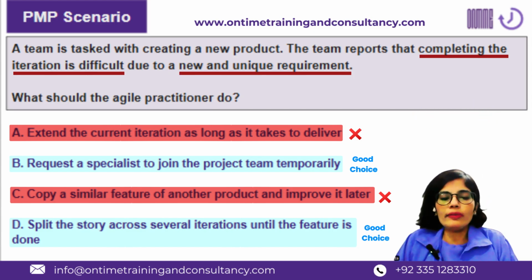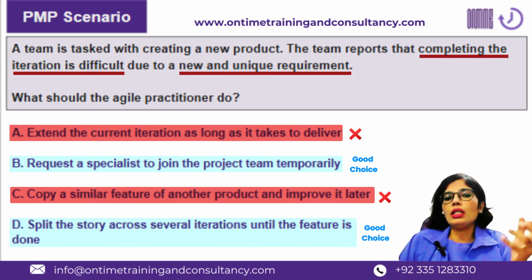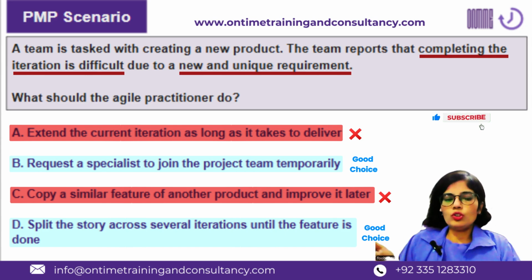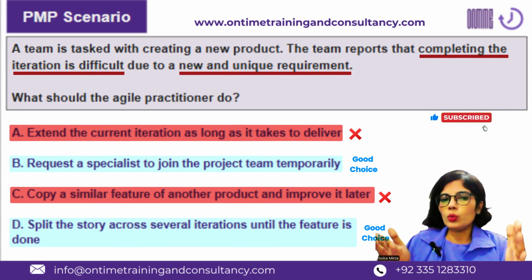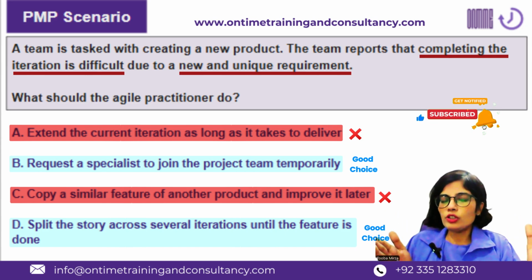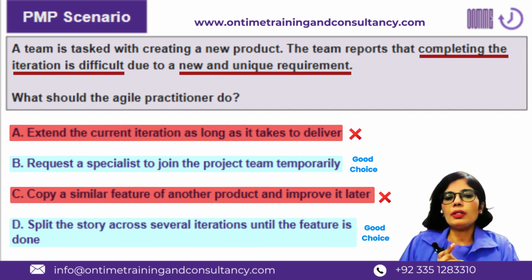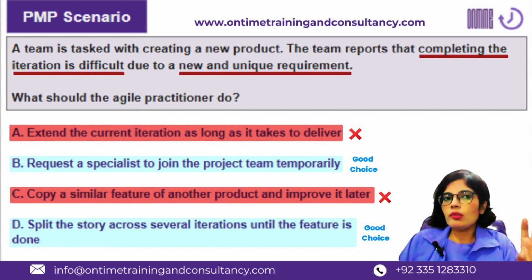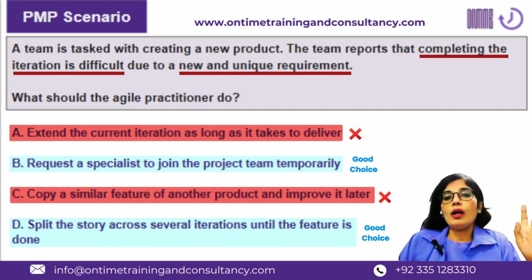And this completely aligns with the Agile mindset as well, because when you are dealing with a story which is extensive in nature, or which has some major scope of work, or which is exploratory in nature, which demands some R&D or some extended work, it's a good option to divide that work into smaller stories and probably span that across multiple iterations. So as a statement, this option is totally okay.